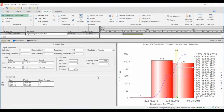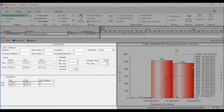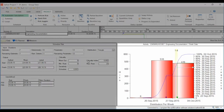The Schedule Risk pane brings schedule risk analysis and Monte Carlo simulation to the planning tool. The pane is divided into two sections: at the left, an input form for three-point estimating, and output simulation data at the right. Saffron displays visual graphics such as distribution histograms and tornado charts.